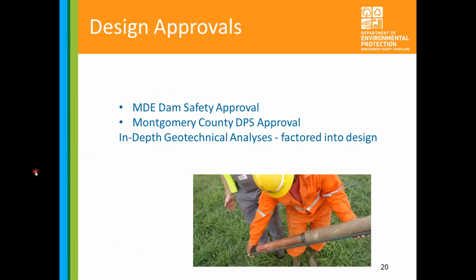So the designs have been reviewed and permitted pretty extensively. We've worked closely with MDE, Dam Safety Division. We've had meetings, conference calls, and correspondence with them back and forth. They have thoroughly reviewed all of the design and all of our computations, and as of right now we've reached a pretty good agreement with them about the design.